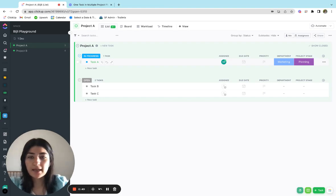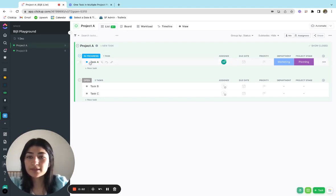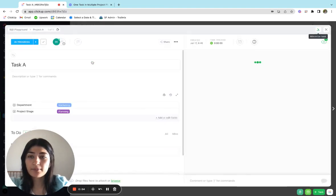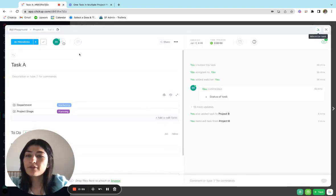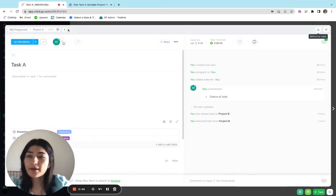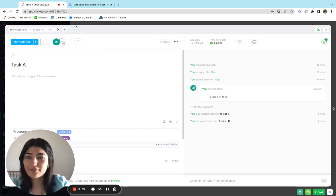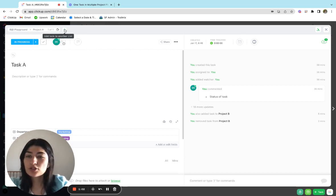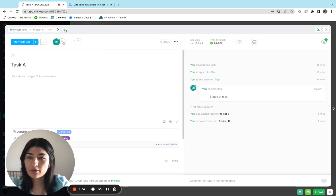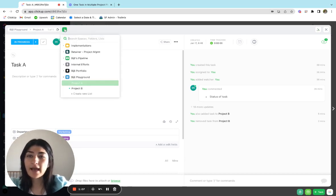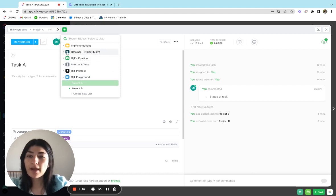So if I open up the task that I'd like to have in multiple lists, which is task A, I can open that up. And if I hover up top here, I'll see this plus sign. It's not always clear, but if you hover, you'll see it right up here. And this shows to me that this will add a task to another list, which is exactly what I want. So if I click on add tasks to another list, I'm able to select where I would like to add this task to.